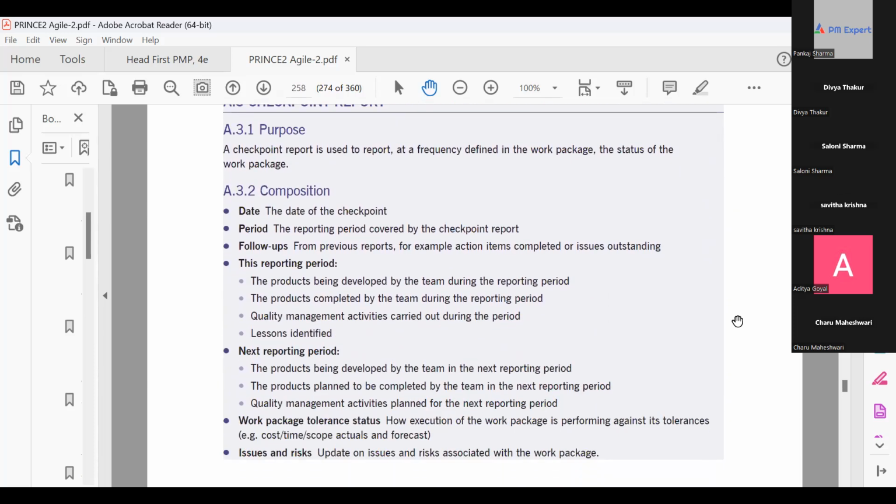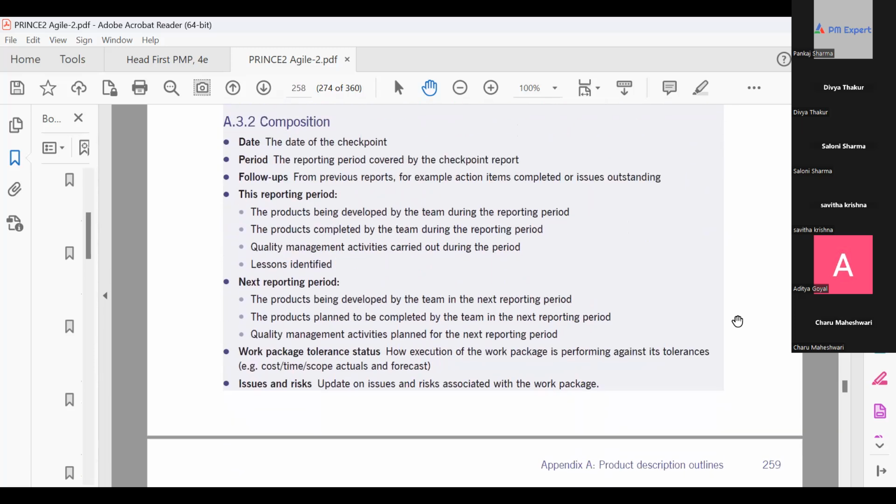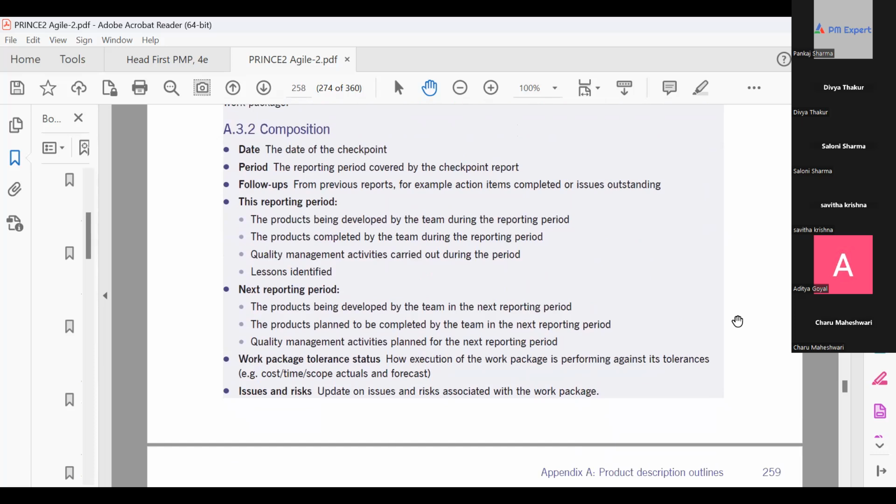Now, can you see a basic weekly status report? These are the compositions. Generally, most of you write this kind of weekly status report. The only thing missing in your report is that you don't forecast, whereas effective project management practices expect you to do a lot of forecasting.